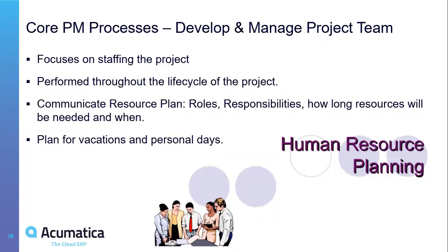I mentioned the kickoff meeting, setting expectations to the customer. Set expectations to your project team to tell them, so this is your role and this is what I expect you to do. If you are the person who has to take care of the reports, I want you to do the report design documents together with the customer. I want you to get this signed off by the project manager from the customer side. Then I want you to do the technical specs for it. And then I want you to do the development. I want you to do the internal testing. And then I want you to deploy this to the customer after it's completed. So make very, very clear to every person in your team what his or her responsibilities are and what you expect from them. Very important.